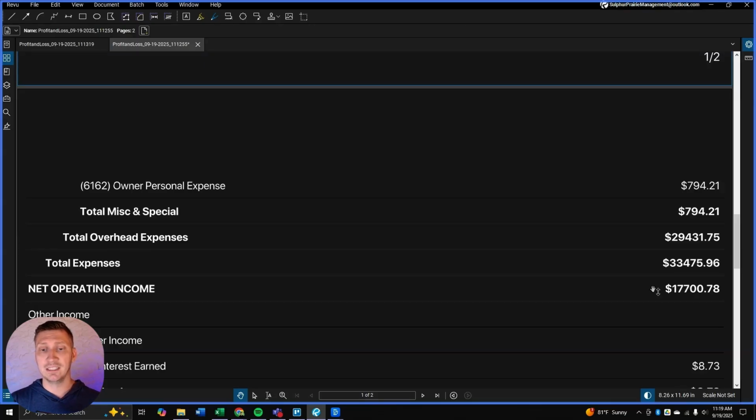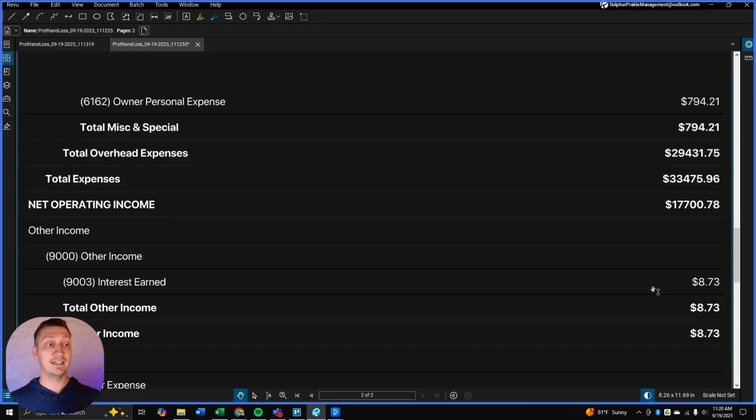Now obviously you aren't going to be showing 17,700 positive in your bank for this month. A couple reasons. Your retention, you're not going to be collecting that 10%. And also, you're not going to be collecting these invoices this month, right? We're going to collect them in 45, 60 days. So how do you actually know what you're making today?